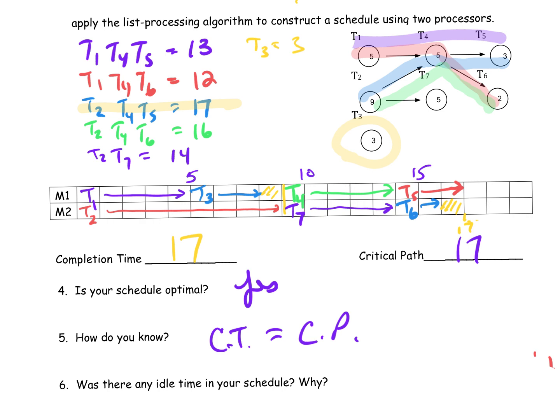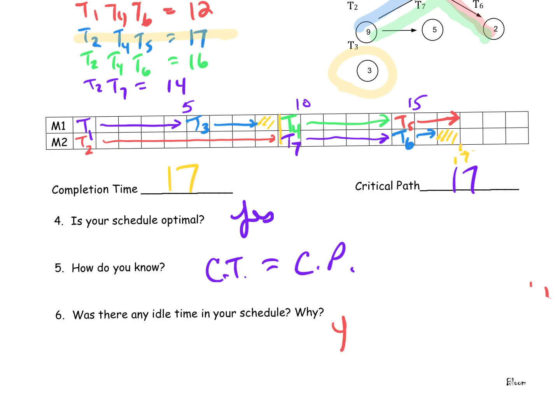When these two numbers match, congratulations — you have scheduled your project in the most efficient, most optimal way. Was there any idle time in your schedule? Yes. We had two units of idle time, but we still managed to schedule the project optimally. Why was there idle time? There wasn't anything ready to process in the project.